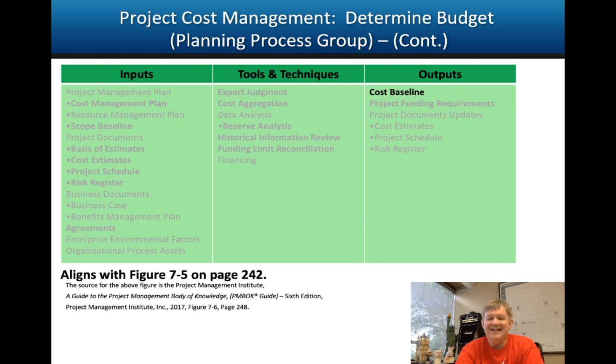Now the cost baseline is a key, huge output here. If you're trying to do earned value, which is going to be in a couple of our standalone videos, I think, if I remember right, one where we discuss it, the other where we do it, you are not going to be able to do earned value if you don't have a cost baseline, because that's going to show you the time phased view from start to finish of the project of when you expect to spend money. In other words, you expect to get work done, thus you should spend money in relation to that. And just because you're halfway through the project, it doesn't mean you should have the work half done. Just because you spent half the budget, it doesn't mean half the work is done.